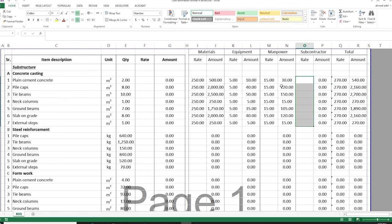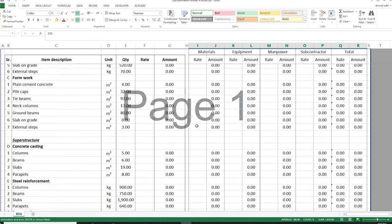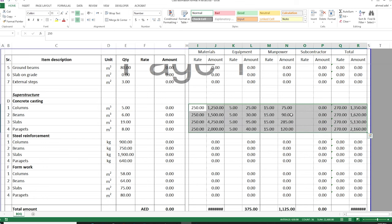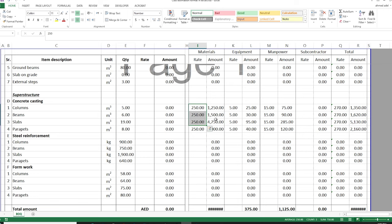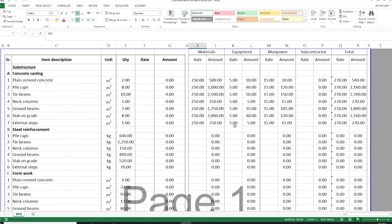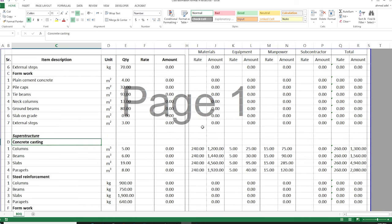So this is how I estimated the cost of the concrete works. Since this is for the substructure, I can take the same line and paste it to the superstructure because the concrete casting is similar — same equipment, same material — or maybe I'll make it slightly more expensive, say 260, if the concrete for the superstructure costs more. You will just have the material rate, equipment rate, manpower rate, and subcontractor rate. I have now finished the estimation for concrete casting for both superstructure and substructure.